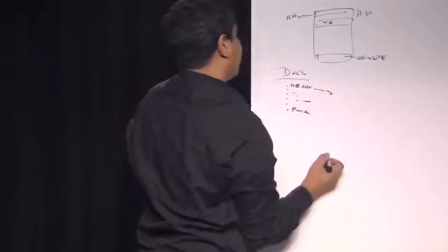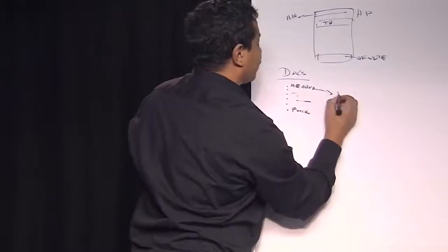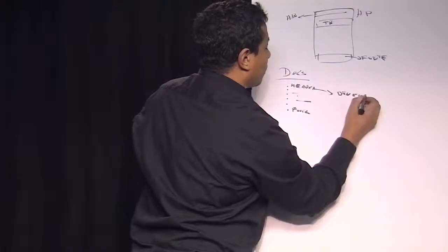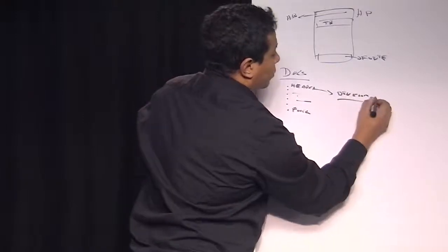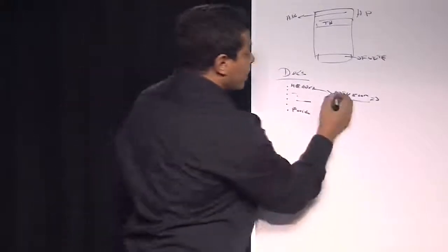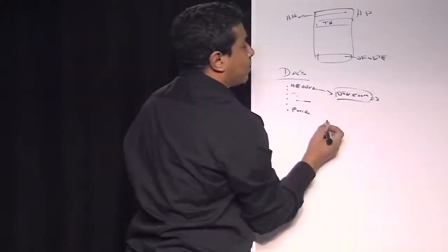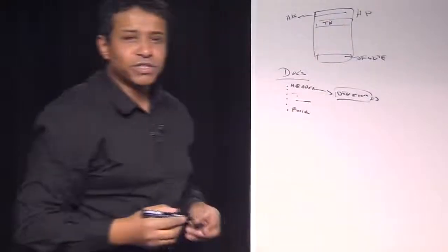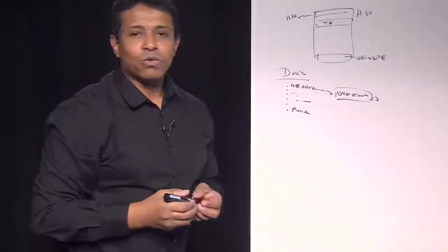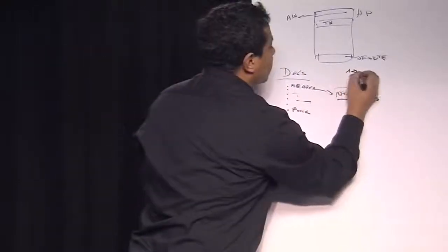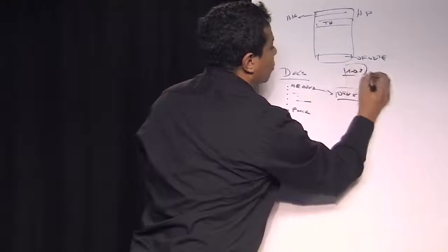I'm doing, let's say, the header first. The crew of developers will tell me if it is possible to do the header that way. It means that I don't have to wait for the whole home page to say, no, it won't be possible. I can say it from day 1 to day 2, which is quicker.